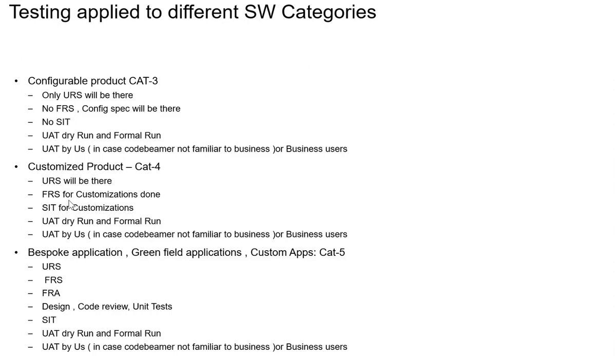So our scope is that we should not worry about the 80 or 90% of areas where implementation is already done and no changes are made. Our focus should be on the requirements that are getting changed and the new requirements being implemented. For these two areas, we have to perform an impact analysis along with the developer and the system team to see what my impacting areas are, what new cases I have to develop, and what my regression cases are.